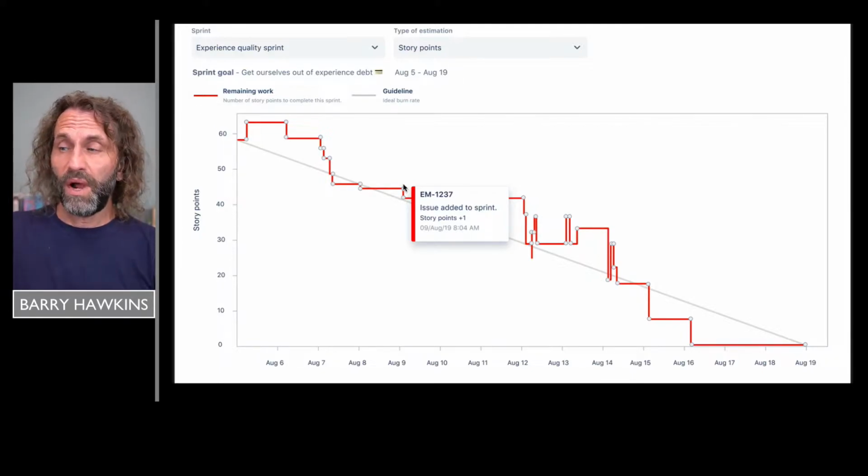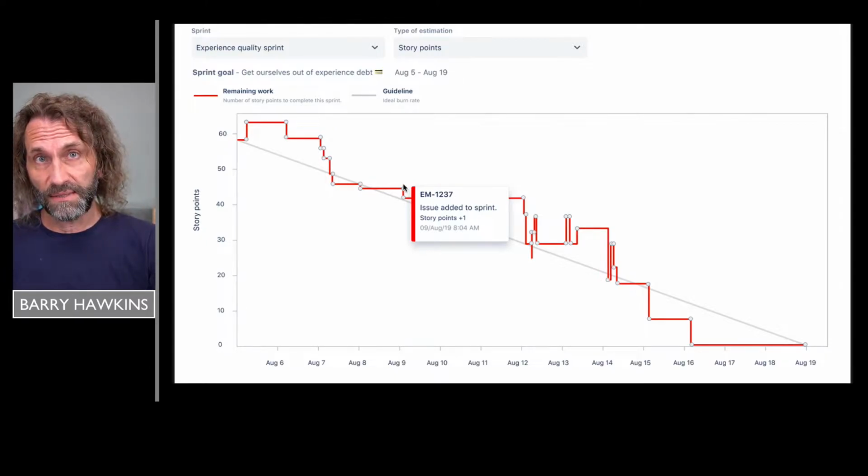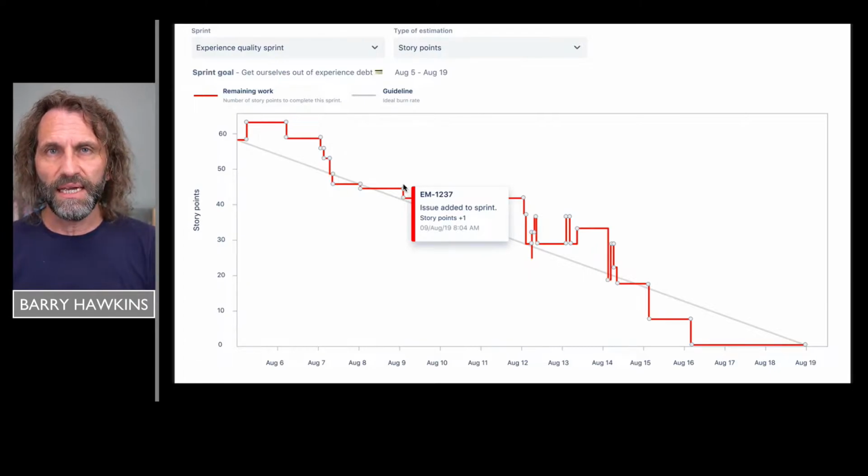In fact, the way that this particular example here is trending more closely to the actual trajectory line, I usually see this when teams are burning down by story points, but the burn down chart is not working for them. So they start to create items in their backlog that are not stories and outcomes, but instead tasks, so that the burn down chart will progress more naturally. And I say naturally, but you can see here that it doesn't really progress naturally in a line graph.